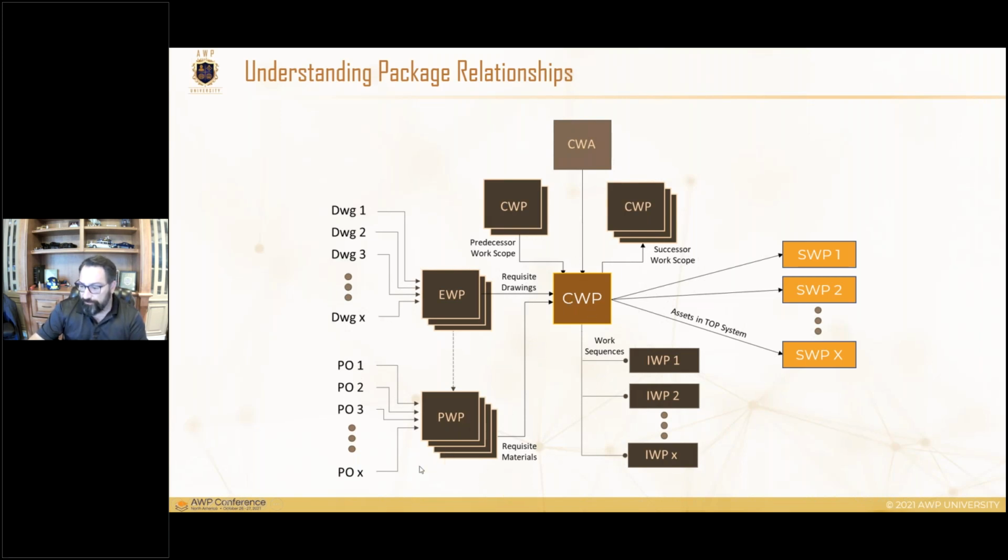Without diverging too far, these PWP ties to CWPs is often where we also do the translation between as designed and as ordered, which is a very important aspect between the PWP and the CWP. What I mean by that is often material engineers will substitute or go up a spec, if you will, for the purposes of material requisition or ease of requisition.